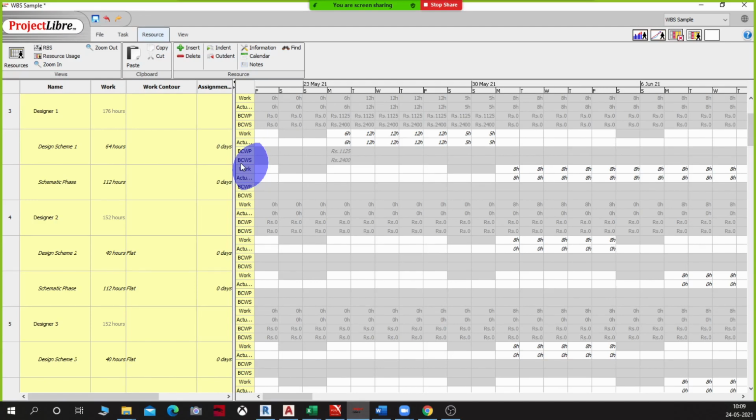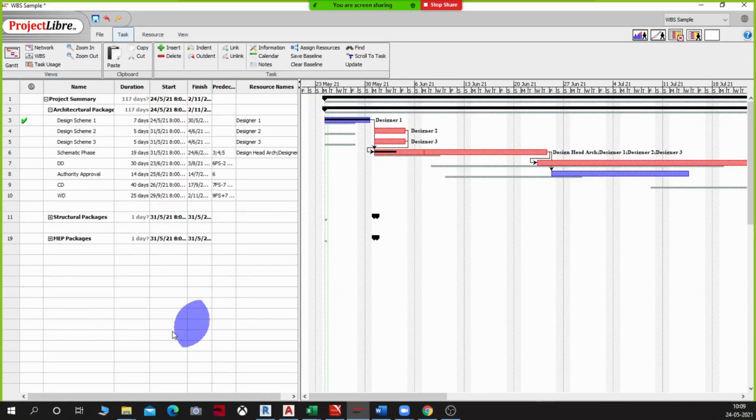It's giving you those two values, okay, right? So let us come back to this now. And here you see, I didn't do this. The program has understood that this work has completed, right? And it's given it a tick. That means this work is over. It cannot affect the project timeline anymore. It has already affected whichever way it had to. So you see that green tick mark which says the task is completed and it is now out of the critical path. So the new critical path is absolving that task. I hope we are clear with that, right?